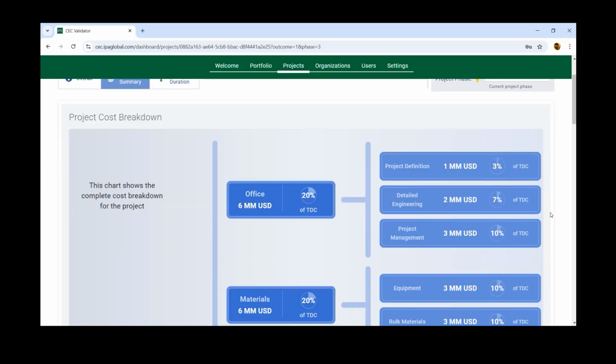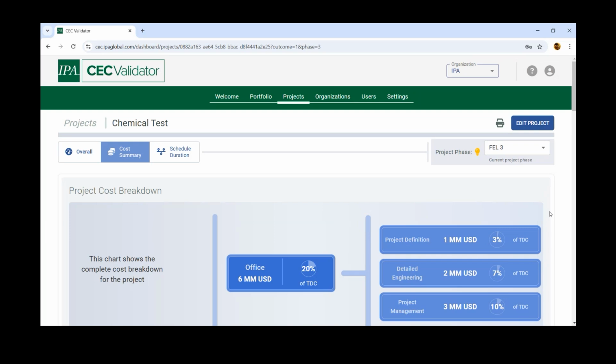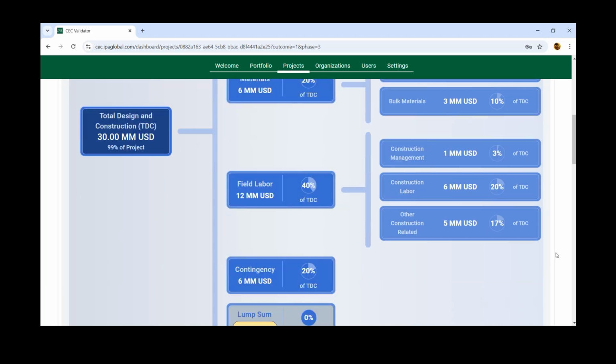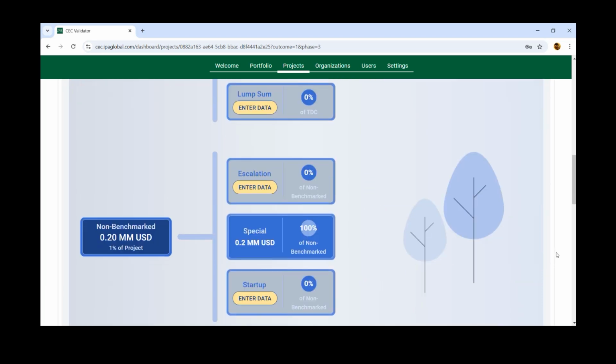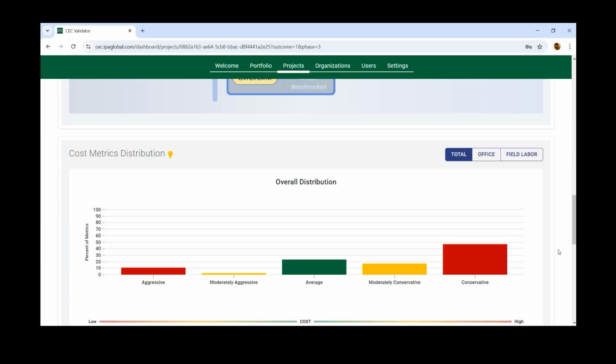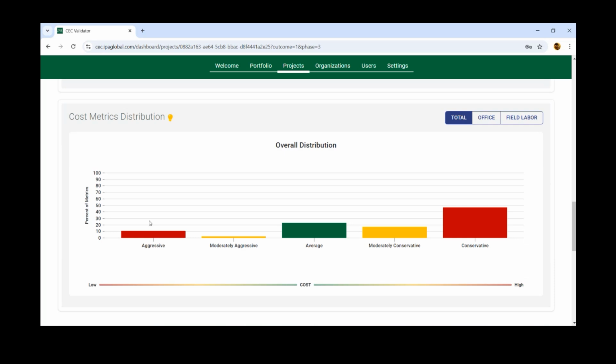And then going into more detail about the cost summary validation. So the top end of cost validation is just recapping what your cost input is, just to make sure that if there is anything incorrect or missing, you can go ahead and edit those things. But this part of the output is where it is taking a deeper look at your cost estimate at a more granular level. So in a variety of ways, it's looking at your project and comparing it against industry average, and then plotting how that comparison looks across 47 models.